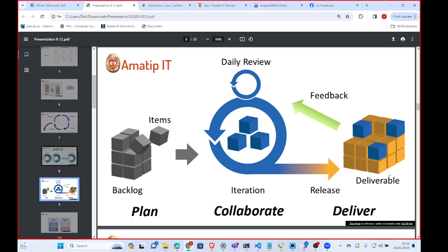Once we deliver it, because the test that we carry out is within the organization, we cannot actually conclude on that product yet until the actual user uses it and gives us feedback on that particular piece. You can see that we did not deliver the entire product at a go. We deliver the product bit by bit, and that is another major difference between waterfall and agile development approach.